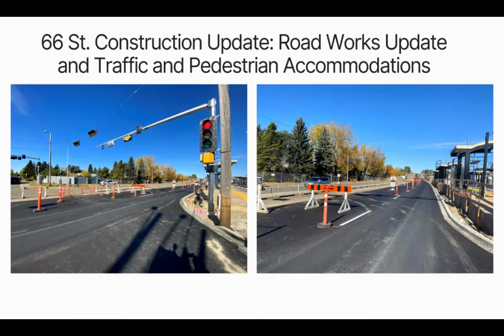Now, Mill Woods has been around for a few years, and there's been an evolution of road work in that time frame over the past decades. What we're having to do now is make sure that the underlying subgrade, we call it, of those intersections is properly built so that it properly drains water and so on. And what ends up happening at the intersection is something we call full depth reconstruction. And that is where we are very similar to what you've been seeing, having to open up a fairly deep excavation and completely rebuild the road.